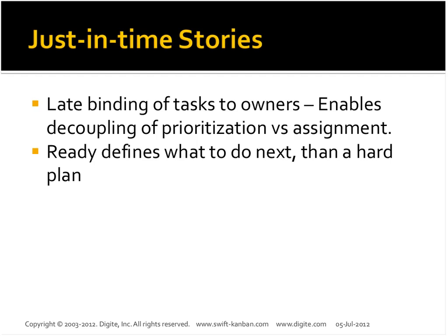So the whole late binding helps in getting much better value of who can do it, as well as it saves time, because you don't have to do a whole nine yards of planning for every sprint, and it gets thrown off every time there is a change in prioritization or a change in the schedule of your own team members.